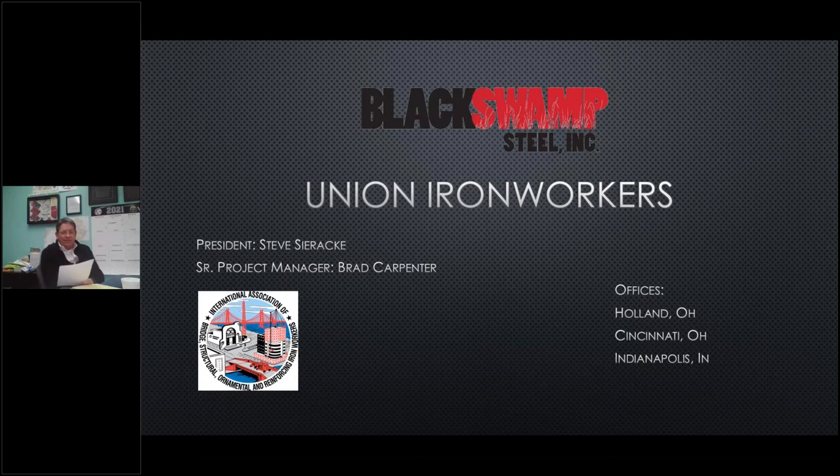But when this first came to us, we were working with Owens Corning and obviously with ODOT, and we identified a few items up front that we really needed to look at, not only company-wise but for our employees. The first item obviously was safety. We asked ourselves, do we need to adjust our safety plan? And if so, in regards to what areas? Administratively, do we need to change our JSAs?